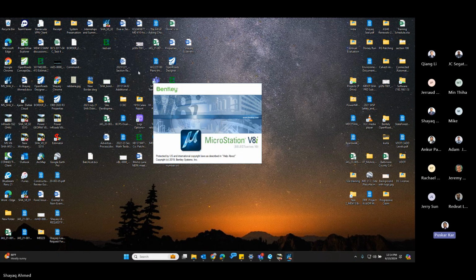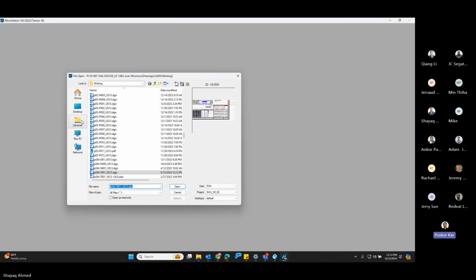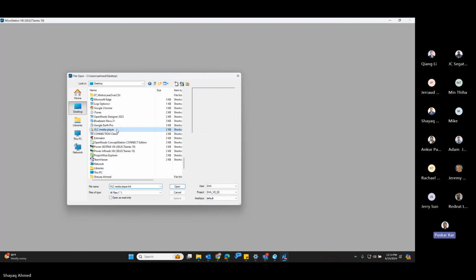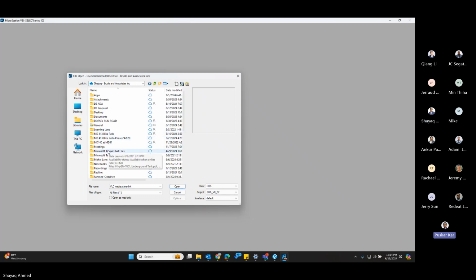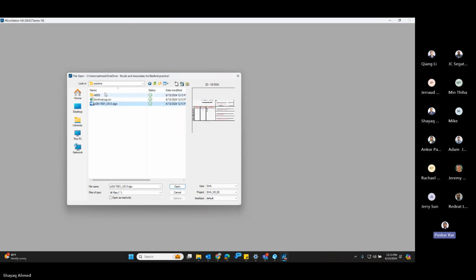Literally after that, any changes that are being made, whether it's an addendum or a red line or a green line, it's a contract modification, whether it costs any money or not. So the archiving will begin, at a minimum, at the advertisement milestone. As soon as you have advertised the plans and submitted everything, you should archive the plans and call it the advertised archive. Then you go to addendum 1, you do addendum 1, archive addendum 1, then addendum 2, and so forth.